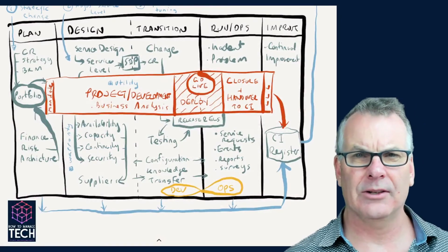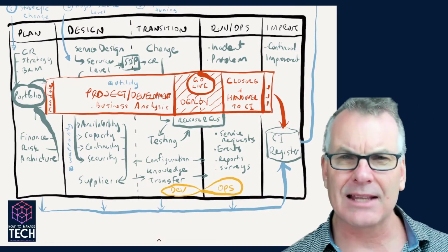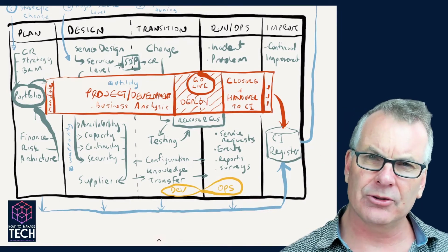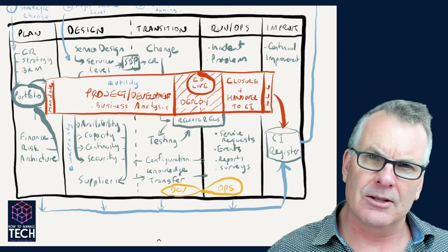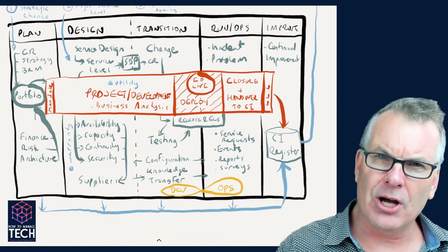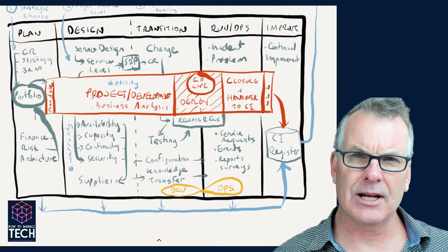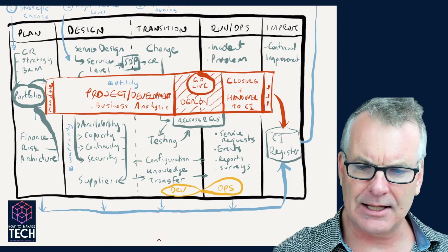One last thing to add in there. So this is, as I said, looks very traditional. We've got a big bang style one pass project going on. But what does this look like if it was in an agile project? Well, what happens is that once the design has been done, a high level design has been done, then the build, the transition, and the run and the learn are repeated over and over in an incremental fashion. So let's add that in.